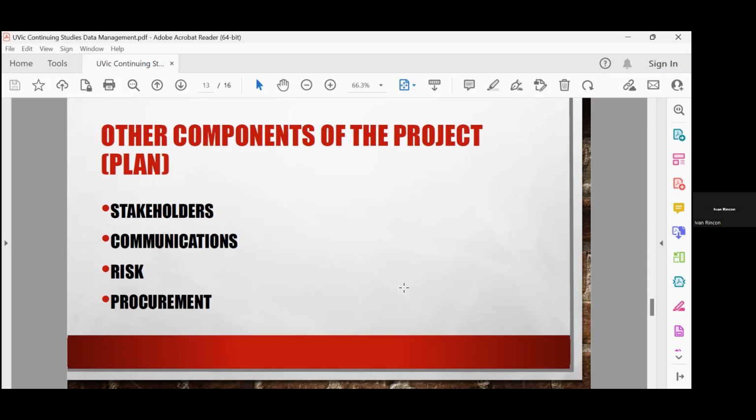For those of you who have had the joy of working in the Canadian environment, procurement in Canada is very complex because there are a lot of rules. So, for example, in government, our procurement cycles are typically 2, 3, 4, 5 months. So you cannot just go and say, "Oh, I need this for tomorrow." Doesn't happen. So guess what? You need to plan for that. You need to plan for procurement. So that's something else that is going to be part of this.